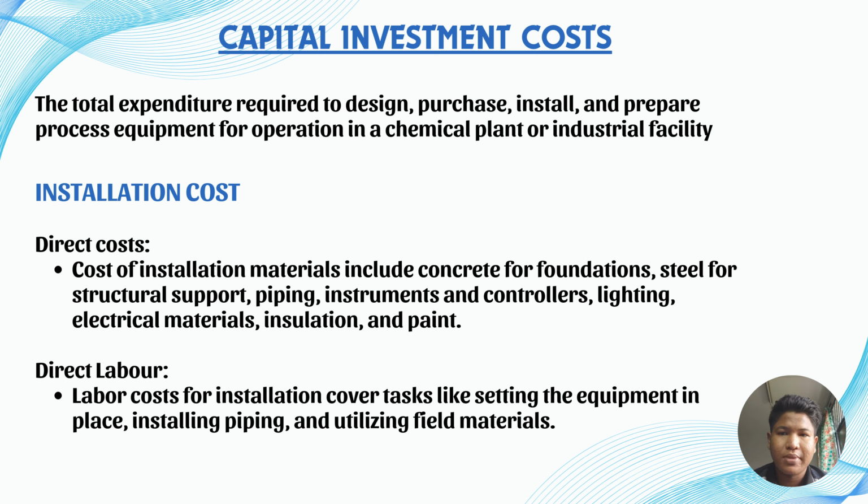Let's start with the installation materials. This includes everything needed to physically install the equipment and make it functional, such as concrete for the equipment foundation, steel and structural support, piping, instrumentation and controllers, lighting and electrical material, as well as insulation and paint protection, and also safety compliance.